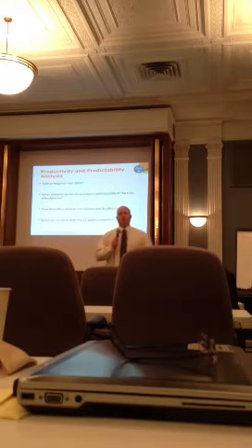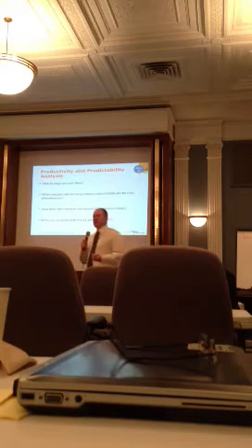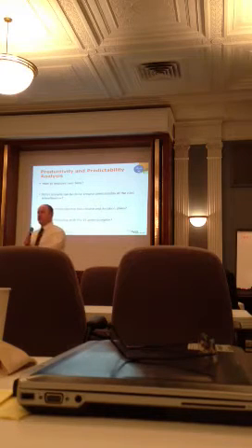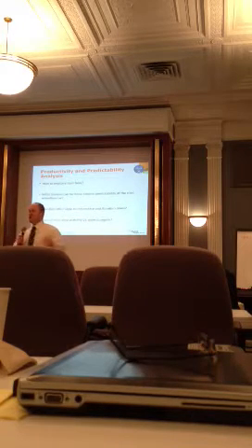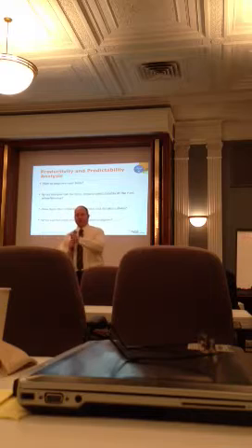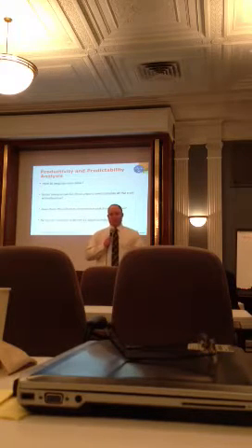So that metaphor is very relevant in an Agile world: Scrum teams are not scalable by just jamming a bunch more people into an existing Scrum team. Scrum teams are scalable by adding another Scrum team. Just like if we had another wheelbarrow and another person, we could be twice as effective probably.